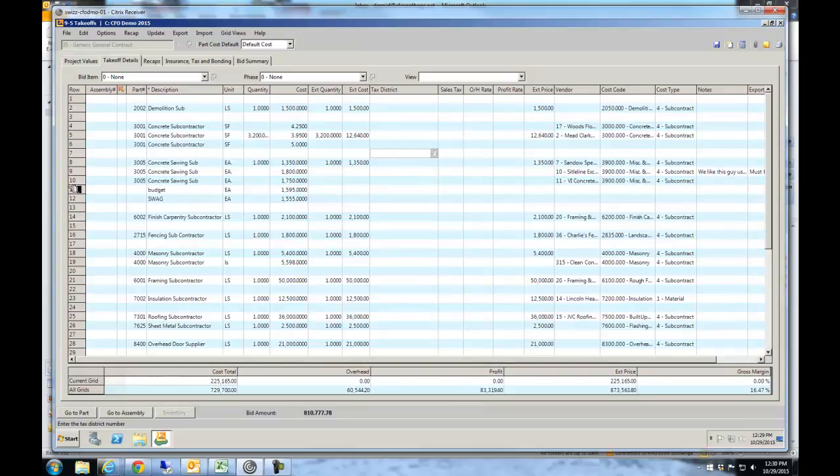So at this point, I can put a budget together just using the swag number by just putting a 1 in here, taking a 1 out of here. You said checkbox, but we use a 1. So if I calculate this out, then I've now put 1555 into the budget as my cost, because that's my guess. As I refine it, I just change the 1 to here.